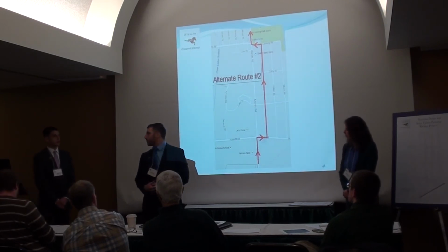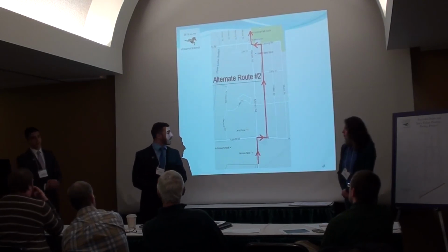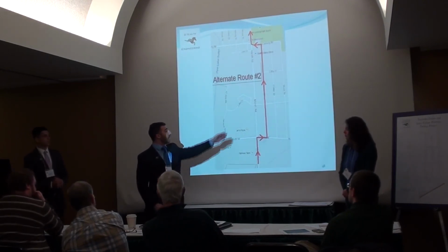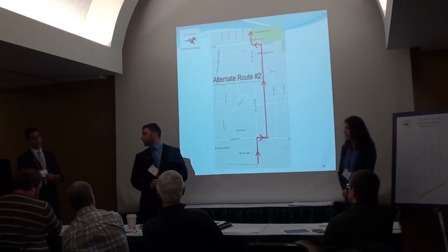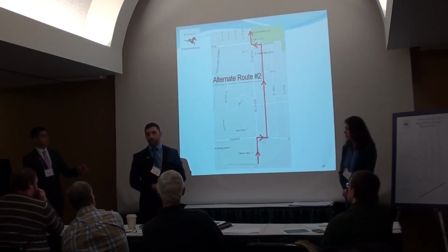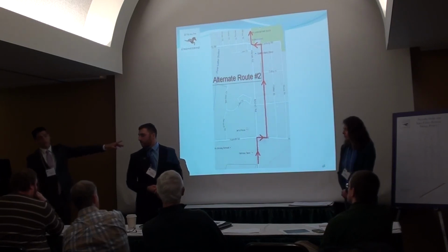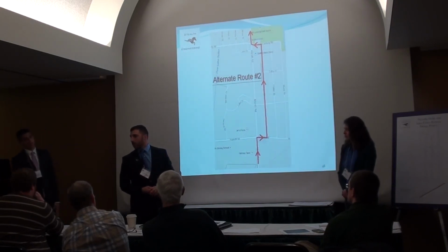It would be only for safety consideration during construction, and this is, I believe, prior to the asphalt overlay. So any distresses that would occur from that traffic could be addressed before the overlay. As well as this won't be entire Marsh Road traffic. They will be able to use alternate Route 1 and 2 as well as Marsh Road will be open as well.